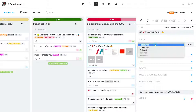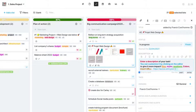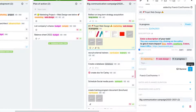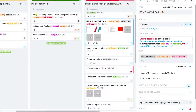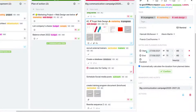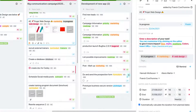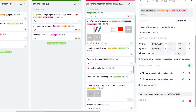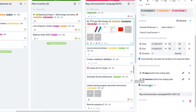For example, you can define a task status, add a description, add one or more tags, add one or more managers, and define the start and end dates, which will enable the task to be visible in the shared agenda of the project. And finally, you can add one or more reminders and set up an overdue alert.